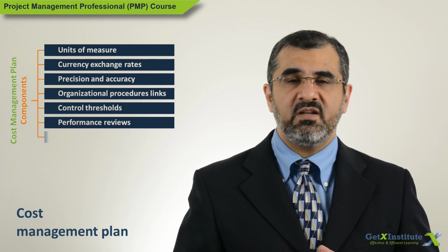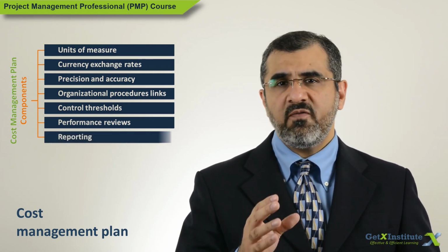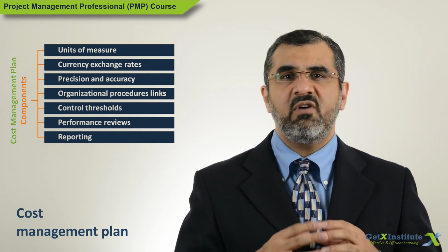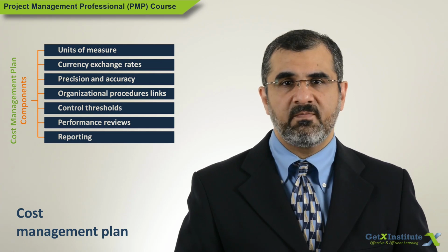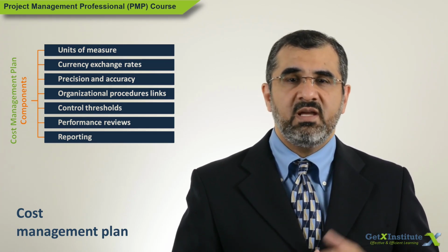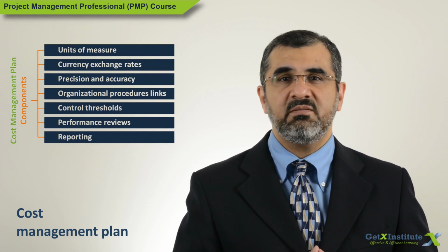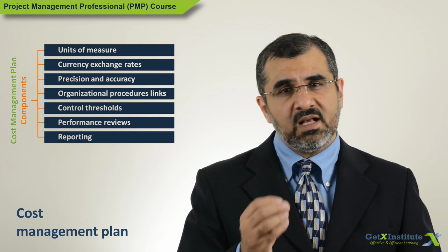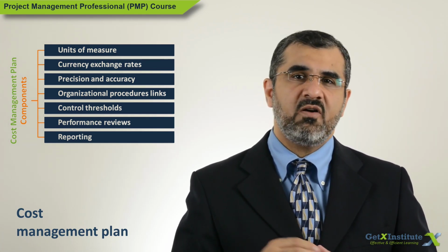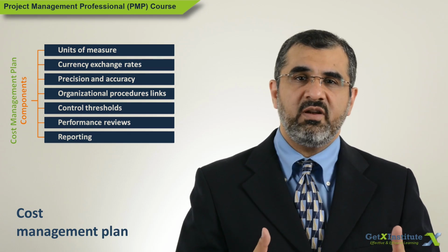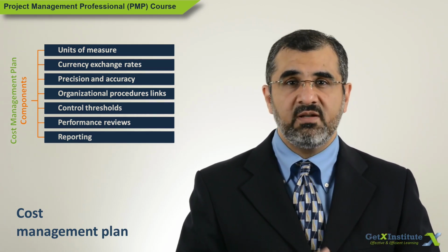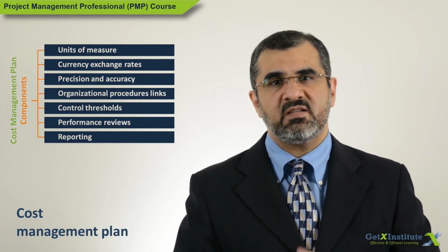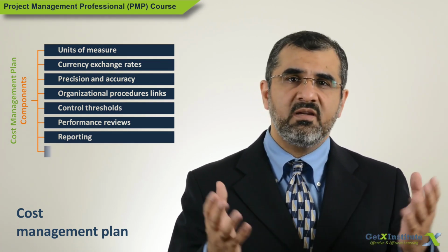Then the seventh factor is reporting. How often the cost reports have to be prepared, which reports, and what will be the format of those reports. Some examples can be a spreadsheet update, a presentation, a database update, a Word document, and other ways. It is also a good idea to define how the costs need to be recorded. Are there forms to be filled? Should cost be recorded after the expense or before the expense? And similar other information.